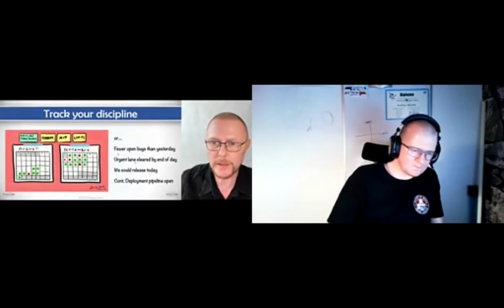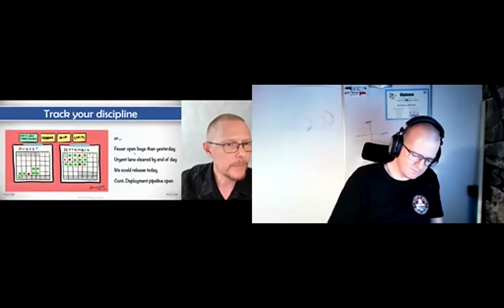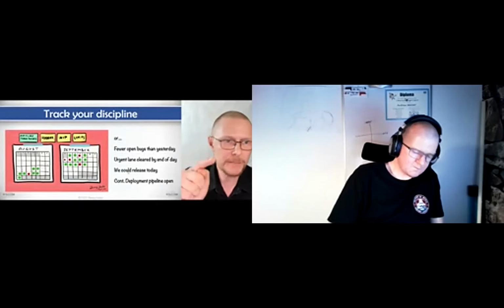And you can have this for other attitudes as well, because WIP limits is about human discipline. Maybe to the right here, you can see we as a team have decided that we want to have fewer open bugs today than yesterday. Is that true or false? We want the urgent lane to be clear by the end of the day. Was that true or false yesterday? If we want to, we can hit the release button today. True or false? So if you have some important behavior, this could be a way to have that on top of the conversation every day.